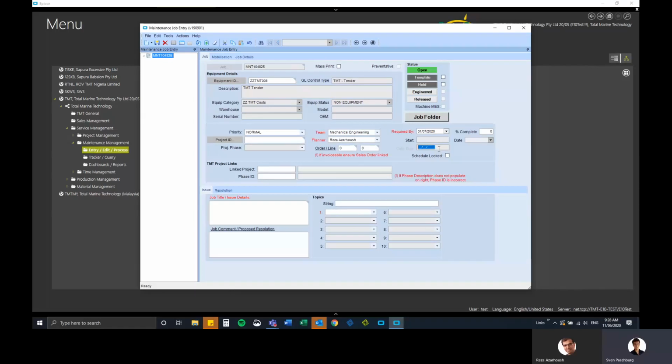At the moment, the resources we use in the system are unlimited, right? So effectively, for a given hydraulics tech, let's say, for example, they can work 24 hours a day, 7 days a week in the system. It's just unlimited capacity at the moment.